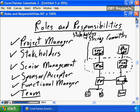So by making very visible the roles and responsibilities of the expanded project team, you are alerting everyone in the organization up front, during project initiation, doing your human resource planning, that, hey, you are part of my project team. Senior management, you are part of my project team, and my roles and expectations on you are, you will receive a regular status report, probably monthly. In this monthly status report, I will alert you to how the project is doing at a very high level, and I'll alert you to any ongoing problems and concerns the project may have, so that if required, I can escalate problems to you, and then you have the information you need at hand to make the ruling, to make the decision that I need to move my project forward.